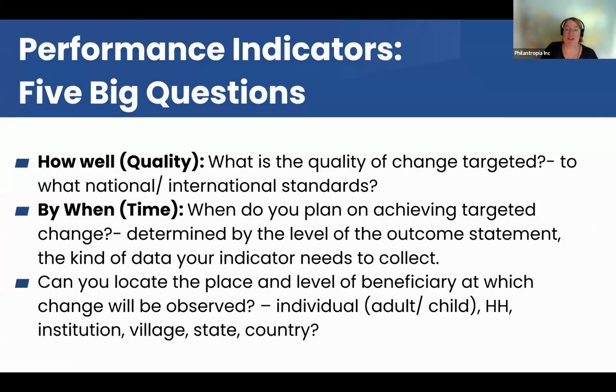What's the quality change targeted? So what is the qualitative measure? For example, if you build a school, should that school then also live up to specific standards, or should it just be there? Which standards are those? If you say, okay, we want 50% of births to be in hospitals, should they adhere to any kind of standards, or should it just be a hospital? That is what you kind of have to define here.